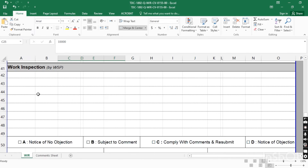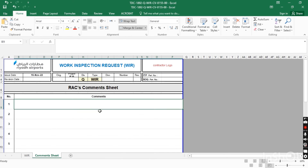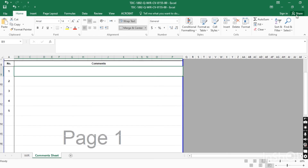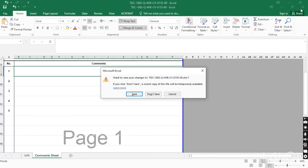When the consultant comes for the inspection, they will use these codes: Code A — Notice of No Objection, the work is approved. Code B — Subject to Comments, the work is approved with comments. Code C — Comply with Comments and Resubmit, meaning you have to resubmit the WIR revision addressing the comments. Code D — Not Approved. The consultant will write their comments in this section; if there are more comments they will attach a separate comment sheet.